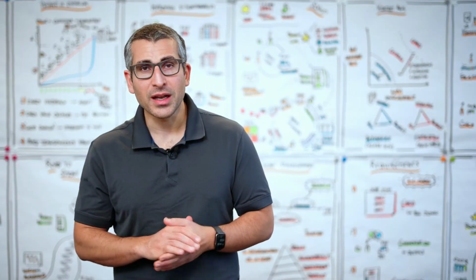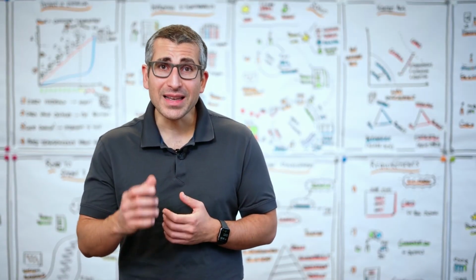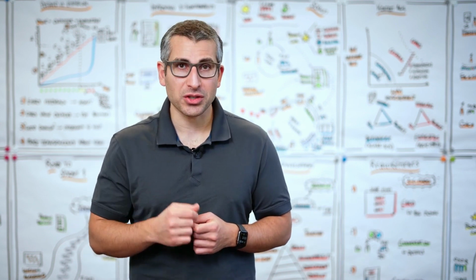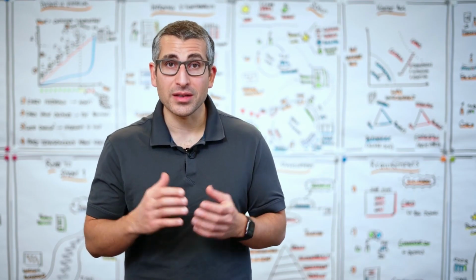Last but not least, we want a product backlog to be estimated, at least the top part of it, so that a product owner can make projections with regards to the next sprint, with regards to the next release towards our stakeholders. Now we have a Scrum team, working agreements, a product goal, and a product backlog.